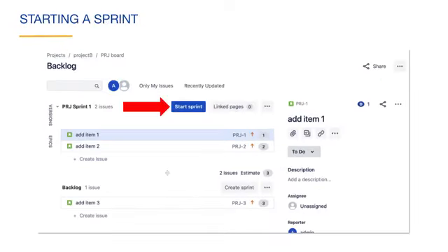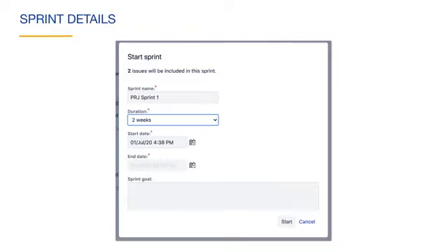When you want to start a sprint, you click the Start Sprint button associated with the sprint. The Start Sprint screen appears. Jira starts by reminding you that you have added 2 issues to the sprint backlog. You can modify the sprint name, specify the sprint's duration, and specify the start date for the sprint. You can see that you can have the sprint started at a later date, so you don't have to actually click the Start Sprint button on the first morning of the sprint. You could also set up multiple sprints at one time.